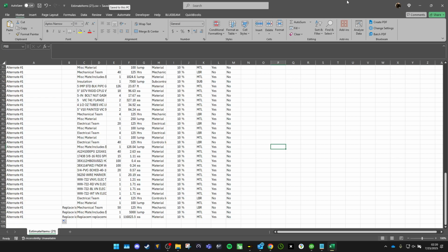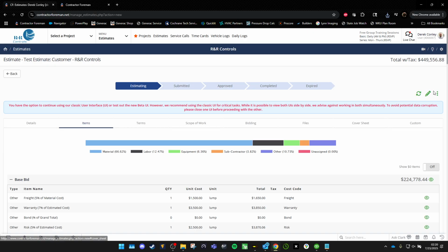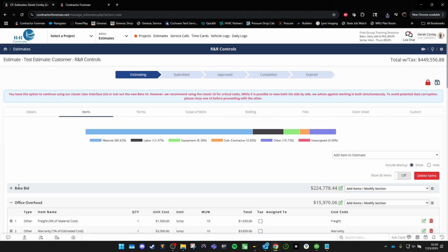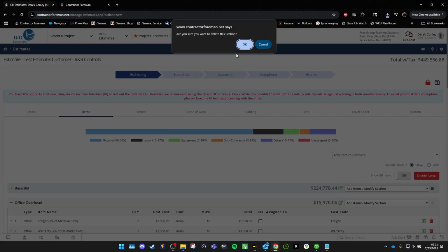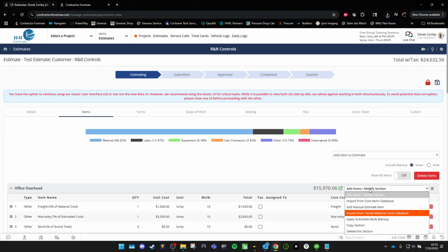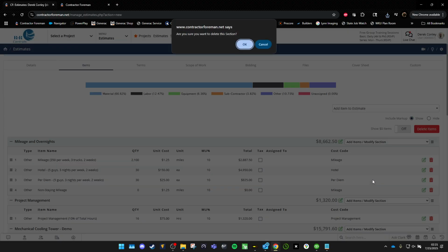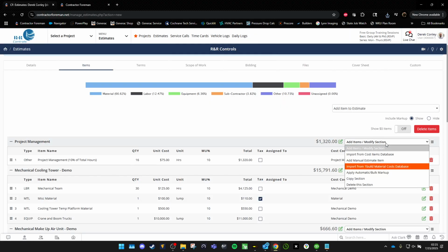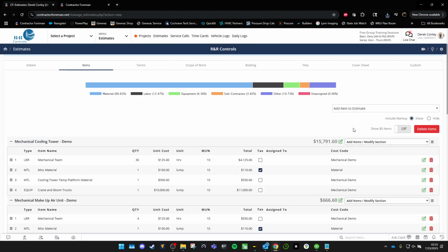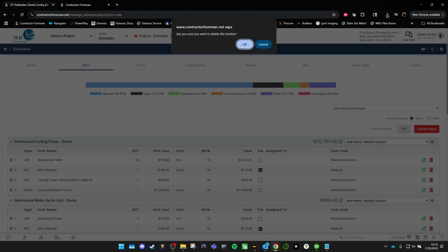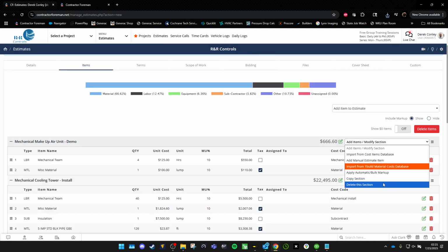That's because whenever we got the scope sent to us to bid off of, they had, here's what we want, but we also want to know how much it would cost to do it this way. That's what an alternate is. Either do it this way or to add certain things. It's just an alternate from the base scope.